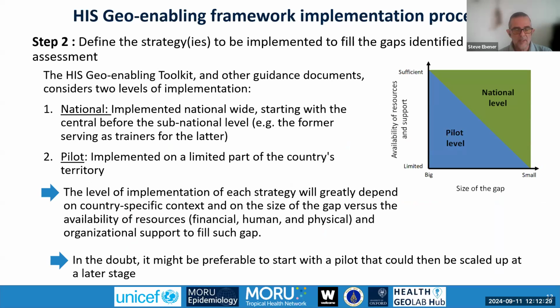There is also a need at the same time to define at which level this strategy can be implemented, because some can be implemented directly at the national level or the central level, but depending on the size of the gap, there might be a need to start with a pilot, right, to implement that in a limited part of the country, and then in the second phase to scale that up to reach national coverage.